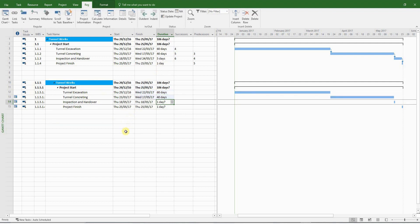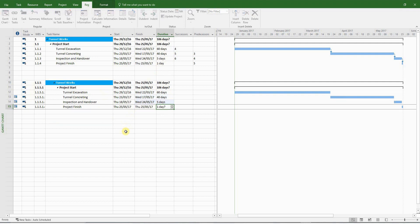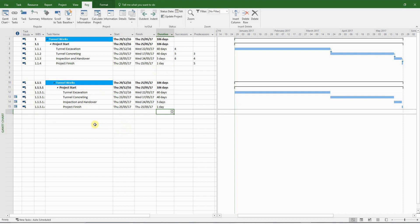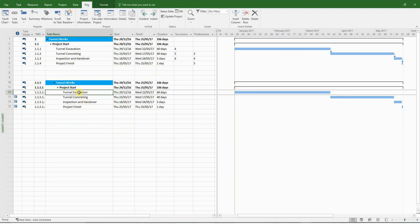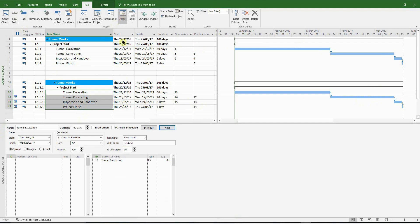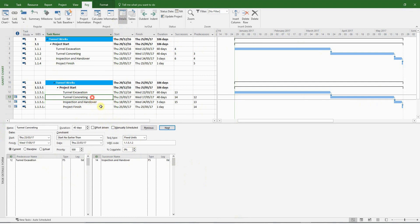Inspection and handover, 5 days. Project finish, 1 day. And finally, we need to link the activities. All will be finished to start links. And it will be a good time to turn on the details panel to make sure everything is finished to start. But it's quite clear from the Gantt bars that they are all finished to start links.